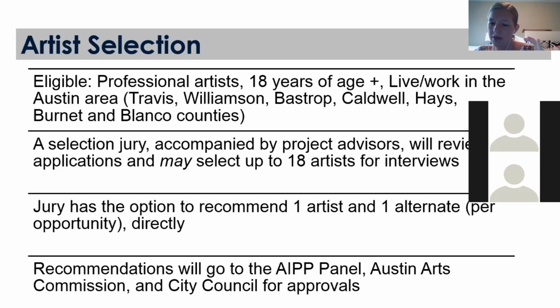And there's milestones in the commission contract for when you submit your engineering documents if you're doing a sculpture, when your site work is complete if you're pouring a foundation, when you've delivered and installed the piece, and when you close out the project. So they're kind of set at different deliverables that the artist must complete. But I'm happy to share some. I think that'd be really helpful, Marjorie, to get a better sense of that.